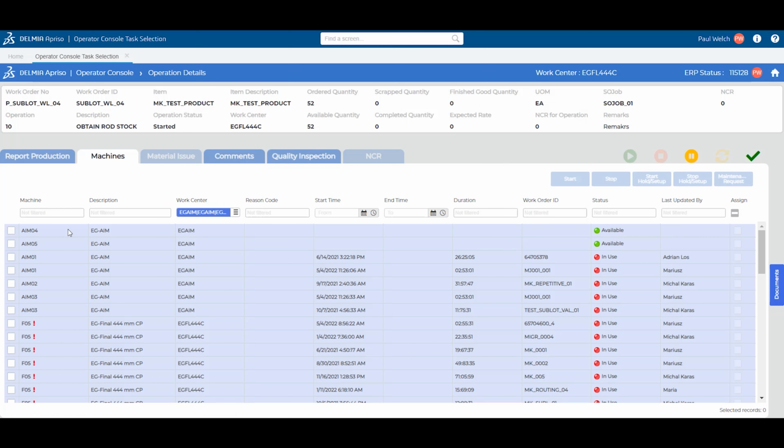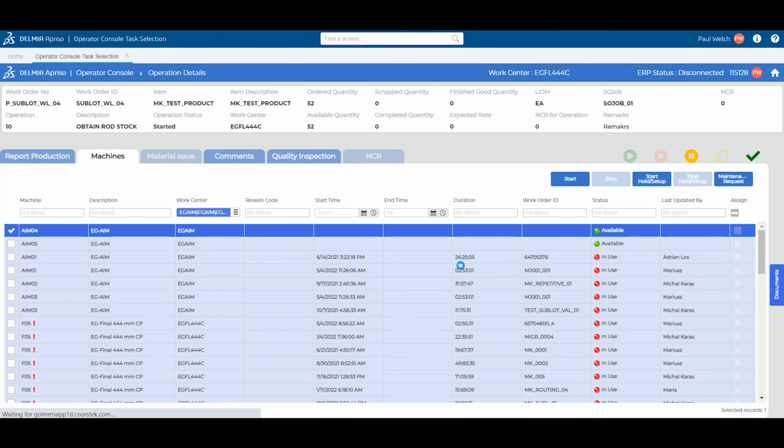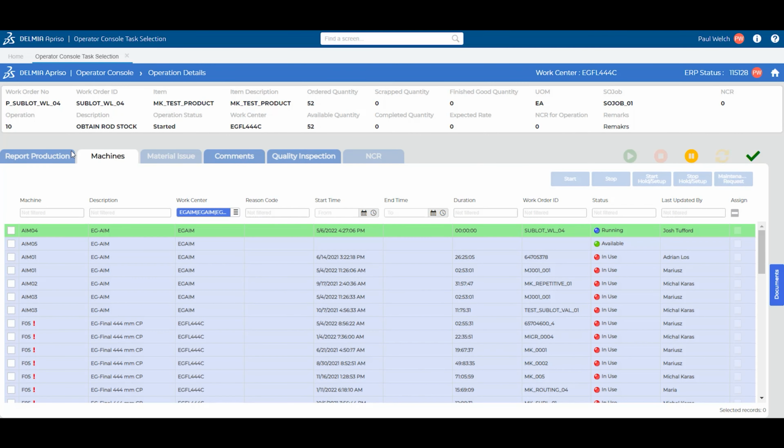It was also important to mention that the entire team was quality focused from day one, and nothing was developed without a plan to test it. We had our project excellence team on board, but ultimately it's CoorsTek who led the user acceptance testing and training. To this day, this is the earliest any customer has taken ownership of the solution. Having that CoorsTek team represent the solution and perform the UAT made it much more real world, resulting in almost no quality or functionality issues being found.